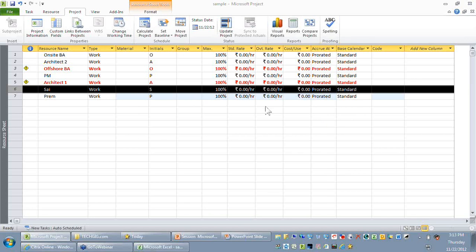Now let's take the next question. How do you use resource substitute? Do we need server for this? Yes, you need server for it if you want to substitute one resource with another resource. This is a question from Raghavendran.